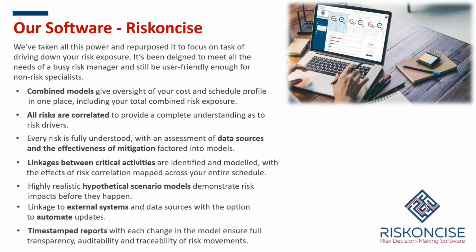Another one might be when you've set a benchmark. If your probability increases above 70%, automatically generate an early warning notice related to that specific risk. So the owner could get pinged on his or her mobile: one of your risks has increased in probability, and there's an EWN been raised as a result. So you can imagine how many applications this functionality has on major infrastructure projects and beyond.